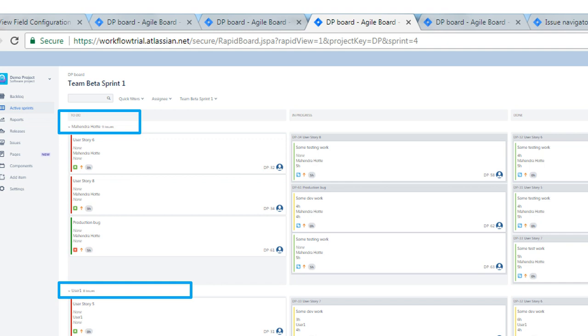A particular user might have subtasks under multiple stories. So this subtask could be under a particular story, this could be under a particular story, this could be under a different story. This format of the daily stand-up makes it difficult for the team members to collaborate and will push the team towards giving their updates and then mentally they might switch off. So it encourages an individual update sort of a model of working and they will mentally switch off, which is counterproductive in the agile world.